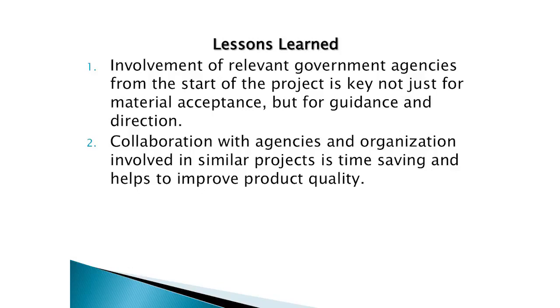And that is why we're having, even for this presentation, a representative from NERDC sending in their response to this project. So that's something that we have learned. Involving relevant government agencies from the start of the project is key to material acceptance. And not just material acceptance, but even guidance on the direction to go with the project, because we got guidance from NERDC in terms of who to contact when we're looking for a specific document.